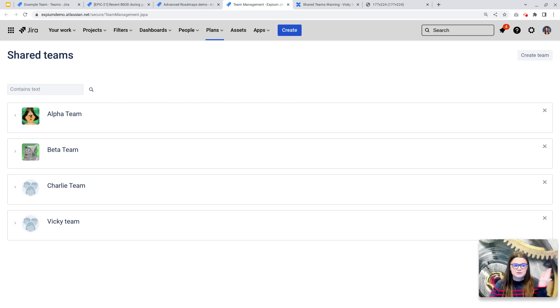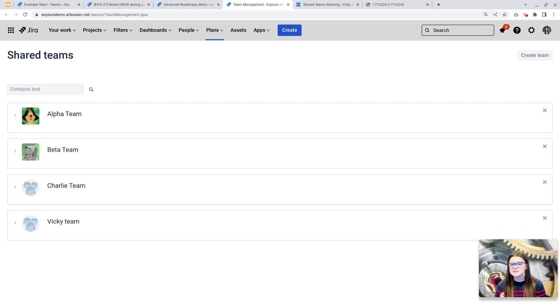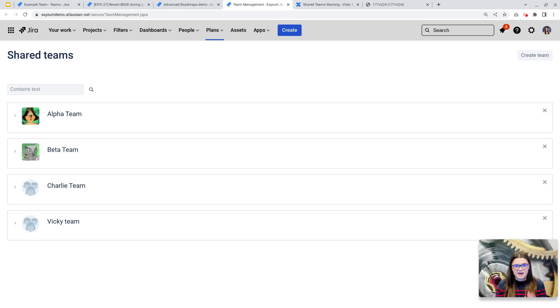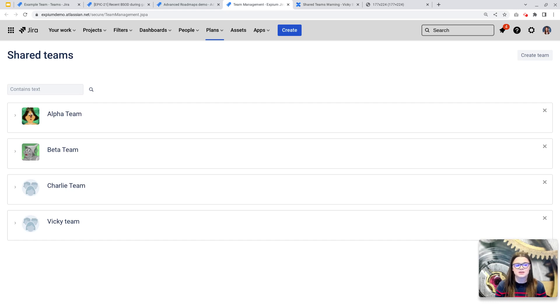In the near future, whenever you create a shared team here in advanced roadmaps, it's going to automatically be a people team in Jira. And this means that they are going to have that homepage and they are going to be able to be at mentioned on issues.